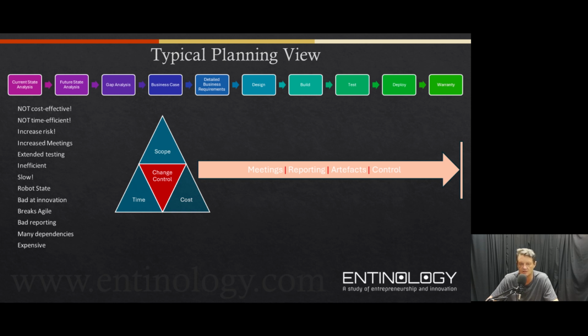The next thing that you need to ask yourself is, often in planning, people don't include the amount of meetings they have to attend. For example, in your project team, you can isolate them as much as you like. They will probably only code 20 to 40% of their day. The rest of the time they'll be sitting in meetings that you never could plan for. Those meetings can be there to assist them in coding, to get more detail. And that's just the coders. I'm not even talking about analysts or designers, other people that you would require to get the job done.